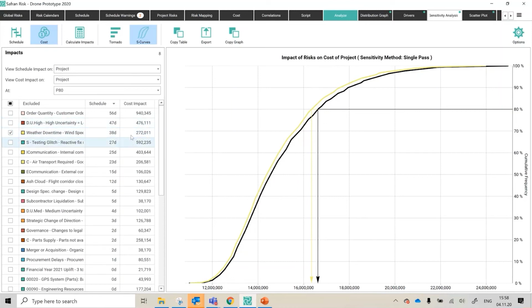It was very useful. And if you go to the other end of the spectrum, you can see in the tabular form the outsourcing opportunity that we talked briefly about on one of the slides. If you remember, the opportunity I think was a £5,000 upfront investment and an additional 5 days of time. Well, the net effect is I'm actually saving 4 days overall, despite an investment taking 5 more days. It feels like it's going to slow me down, but actually outsourcing was a smart thing to do because of the big time savings elsewhere.